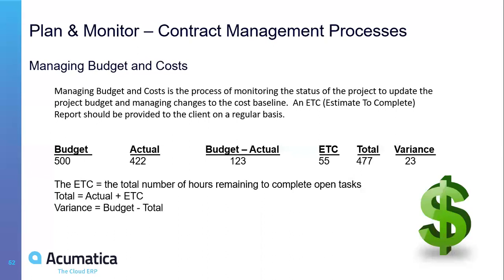It's in this example that I'm showing here. Let's say it's 500 hours that I have available. So we are shortly before go live, so not much work left on the project anymore. So my consultants and I myself, we used 422 hours so far already. There's something really wrong with the formula here, right? That's interesting. I didn't see. It's prepared by our US team. So for me, 500 minus 422 should be 78, right? So budget minus actual is 78.